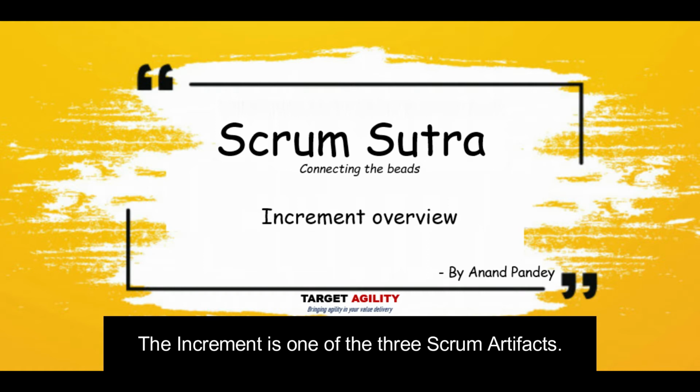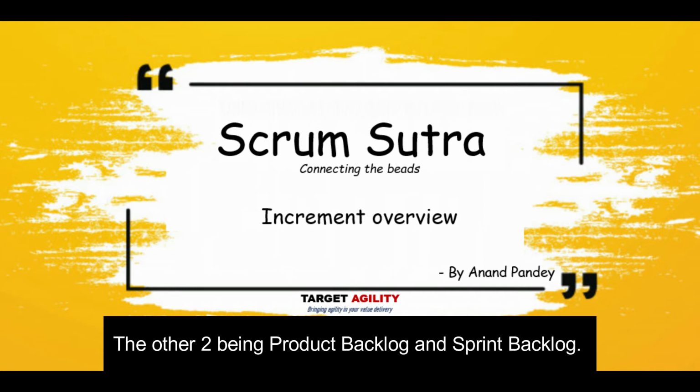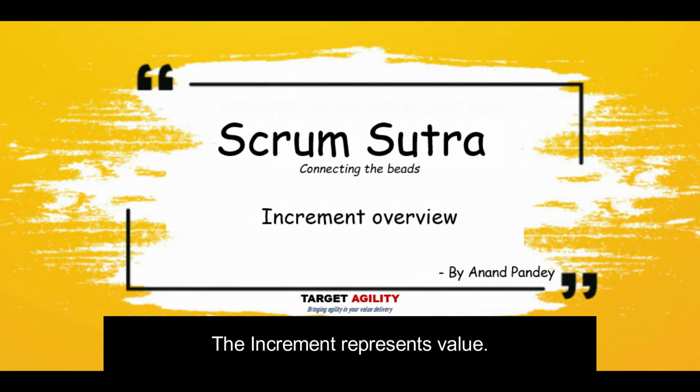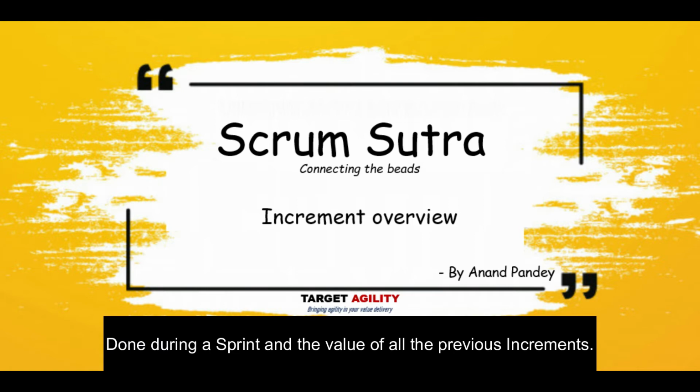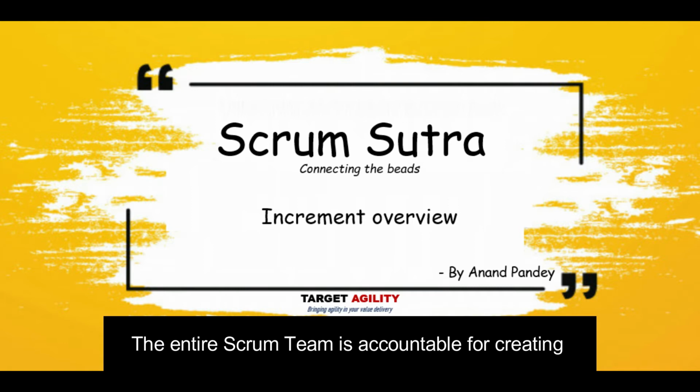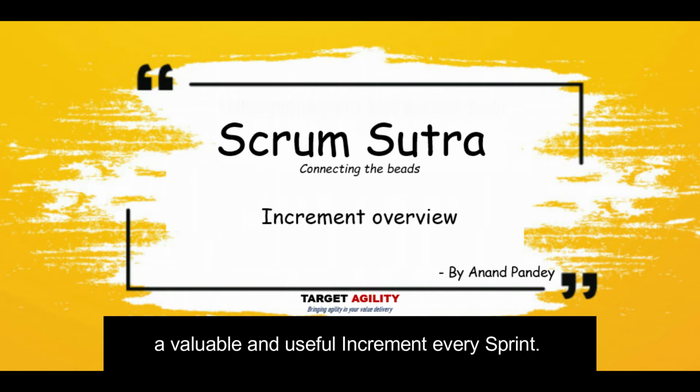The increment is one of the 3 Scrum artifacts, the other 2 being product backlog and sprint backlog. The increment represents value. The increment is the sum of all the product backlog items done during a sprint and the value of all previous increments.